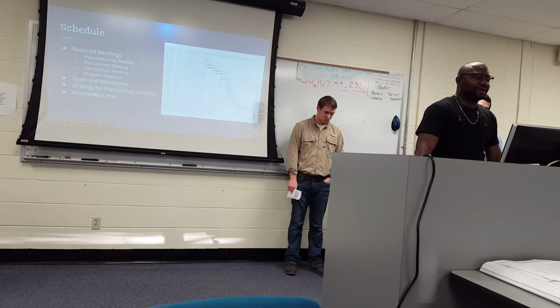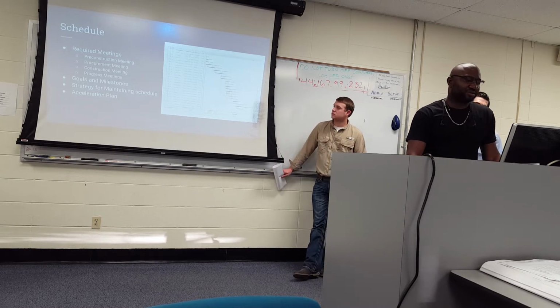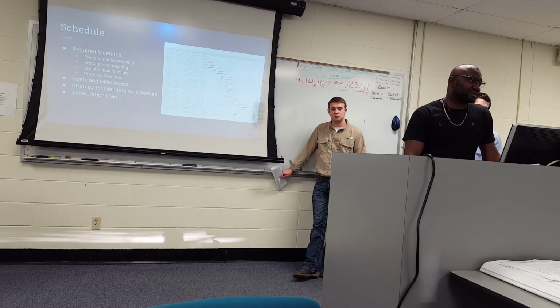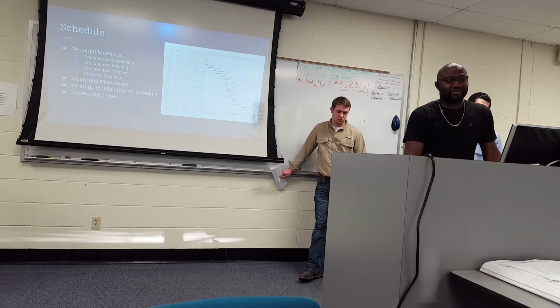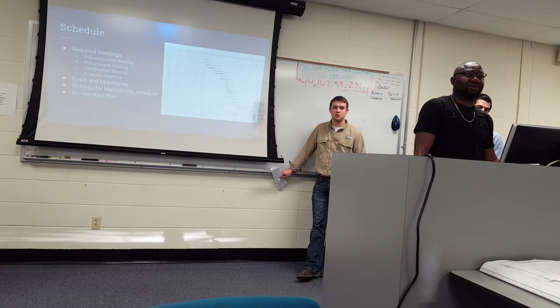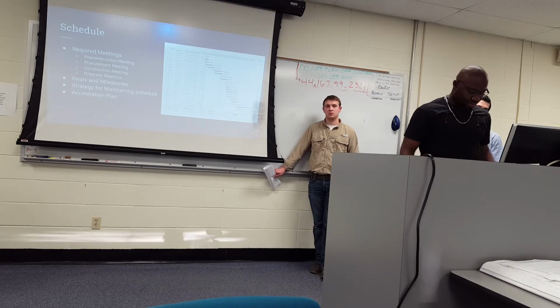So, our schedule plan, along with the safety program and the logistics: we are trying to create a schedule that would be mainly focused on what the owner would be wanting. So we are focused on duration. We had a start date of April 24th, and the end date was to go up to November 9th, so roughly about 140 days for the project.